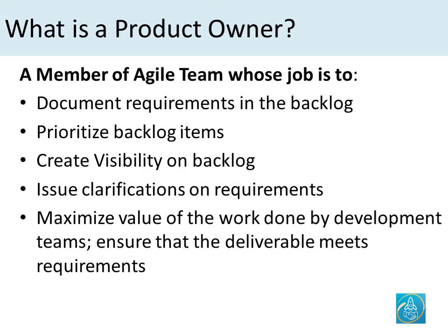A product owner needs to issue clarifications on requirements. So development teams are working on certain feature requests either during the planning stage or during development. If they have certain queries around any features or requirements, that's what the product owner needs to answer. And then it is the role of the product owner to maximize the value of the work that is being done. So essentially, prioritize the tickets in a way that the most impactful items, the items that deliver the most value to the business users and to the business itself, are ranked at the top of the backlog.